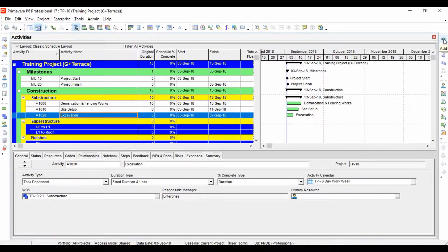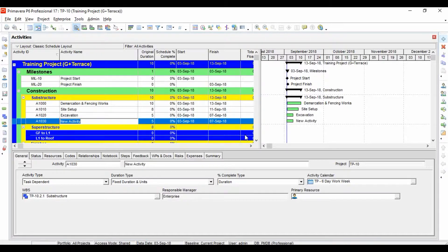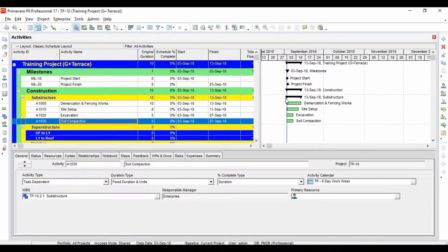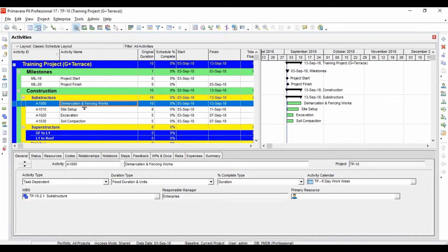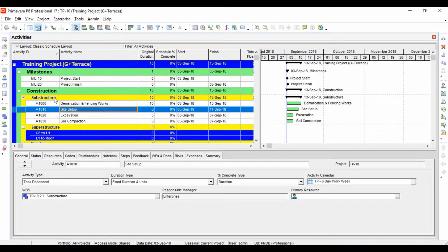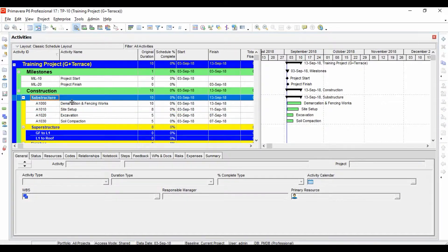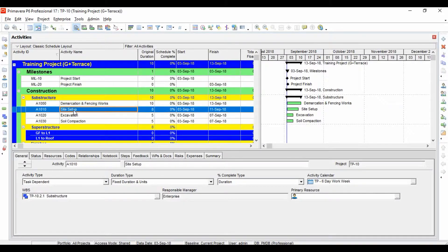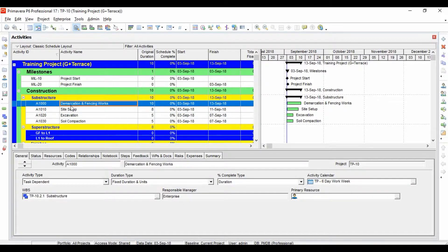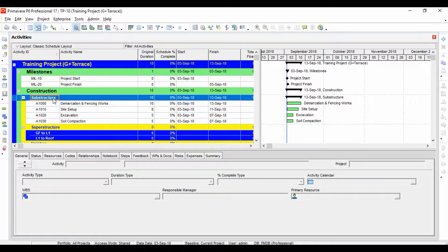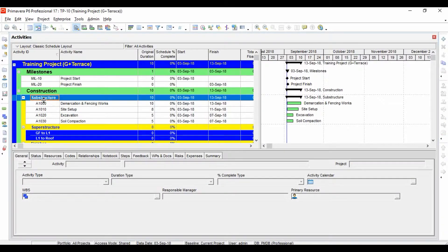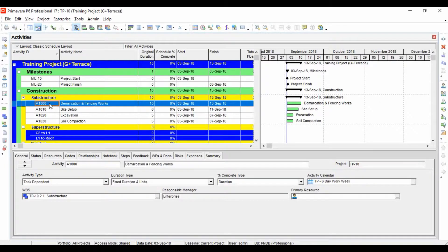If you see, activity IDs are increasing at increments of 10. Soil compaction... but demarcation is not part of a substructure activity. They are part of general common activities. Like we have discussed before, this WBS should consist of activities which are only part of the WBS, so we should contain only activities that are part of construction of substructure.